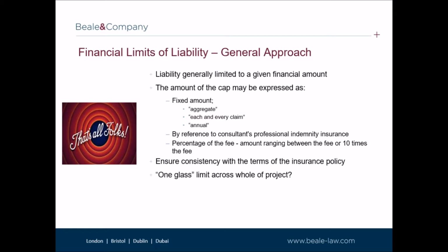Another common approach is having a financial limit of liability clause which is limited to the fee or a factor, say 10 times of the fee. Again, this is usually fine. However, this drafting also needs to be carefully couched. For example, does the reference to the fee mean the fee payable to the consultant across the whole of the project, as stated in the appointment when it is signed?